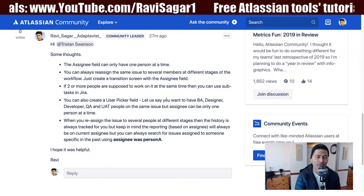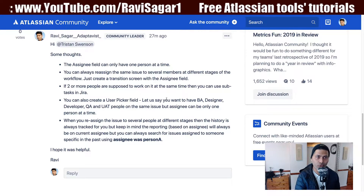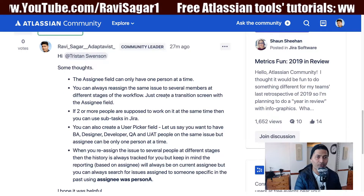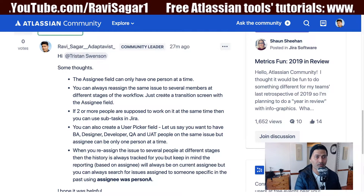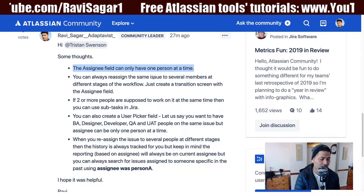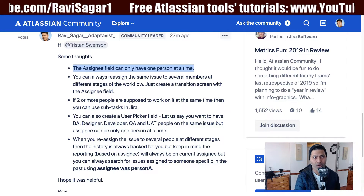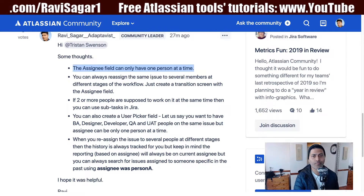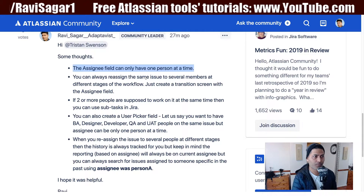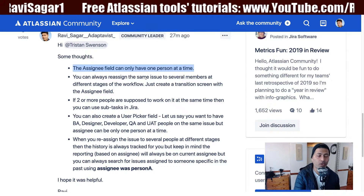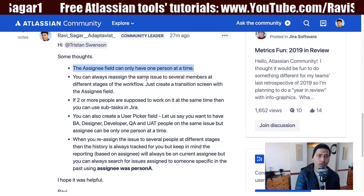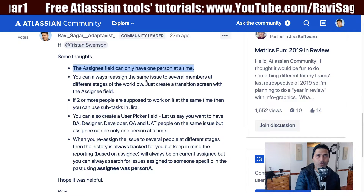The short answer is no — you cannot have two people assigned to an issue at the same time. In Jira, you do have an assignee field, but that field can only have one person assigned at any given time. I understand this situation though — maybe you want to track two people working on an activity, either at the same time or sequentially, where first one developer does the work and then it's passed on to a different person.